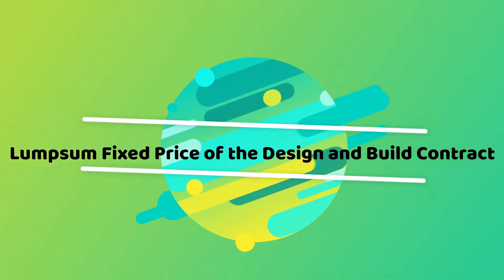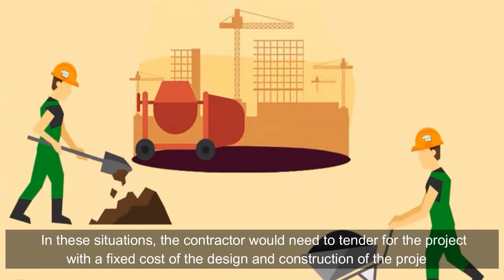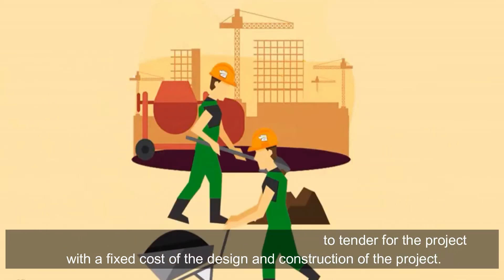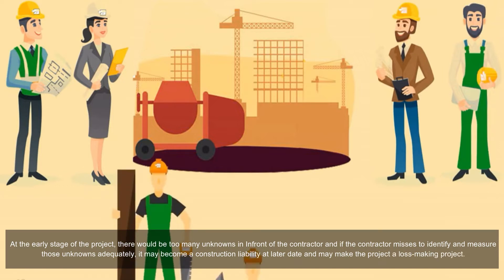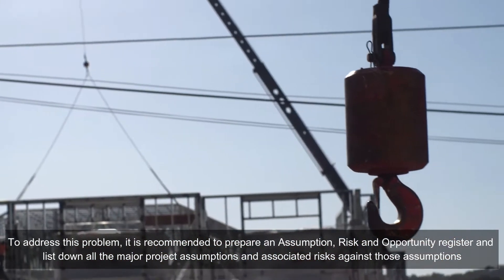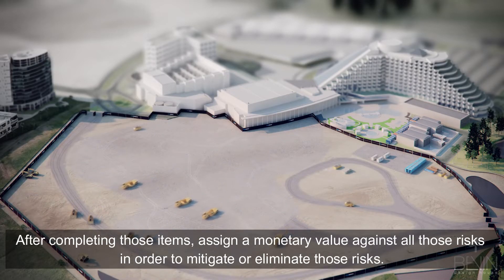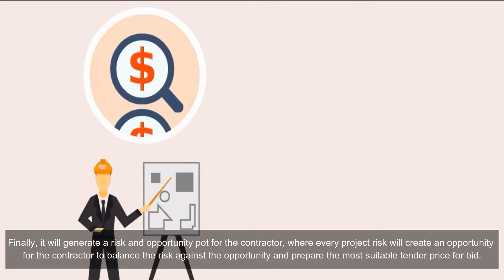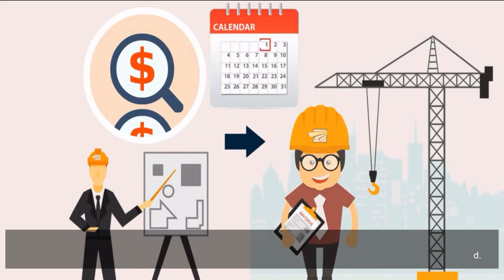Lump sum fixed price: some design and build contracts come with a lump sum fixed contract option. In these situations, the contractor would need to tender for the project with a fixed cost of the design and construction at the early stage, where there would be too many unknowns. If the contractor fails to identify and measure those unknowns adequately, it may become a liability at a later date. It is recommended to prepare an assumption, risk, and opportunity register, list all major project assumptions and associated risks, assign a monetary value against those risks, and prepare the most suitable tender price.